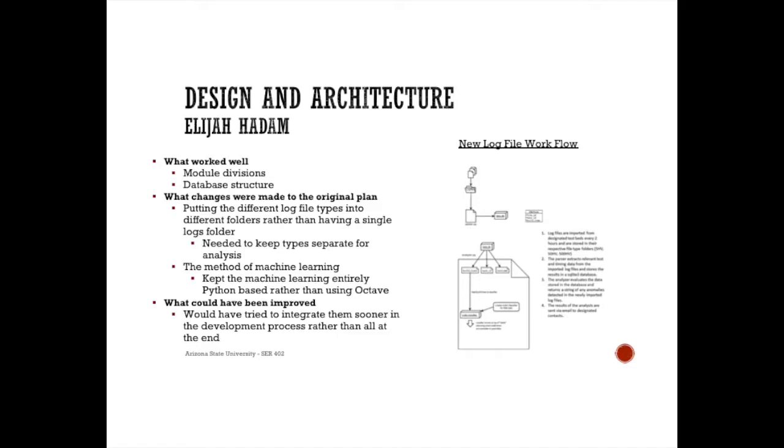As to improvements that we could have made, definitely what we should have been doing from the very beginning was considering this as a unit. We developed everything as individual modules and really left the last sprint to trying to get everything integrated so it would run from a single file. If we had this to do again, we should try to have the single file in mind, and be integrating it as we built out those other modules.